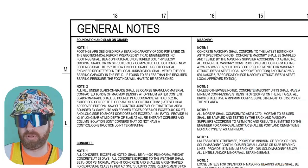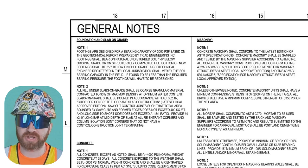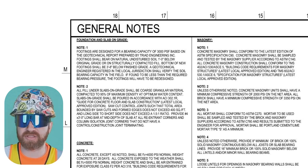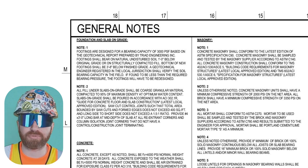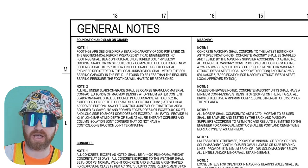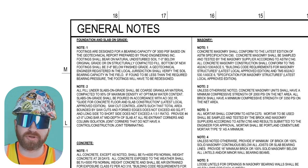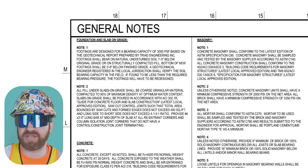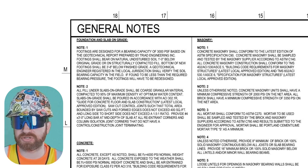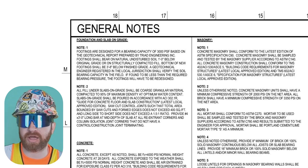The submittal will likely be a mix design submittal, which shows everything the concrete is comprised of, including the final strength for each concrete mix used throughout the project. A project can have multiple mix designs for different areas. While the concrete is being poured, there's an additional checks-and-balance via testing to ensure it won't fail or collapse before the next construction activity starts.